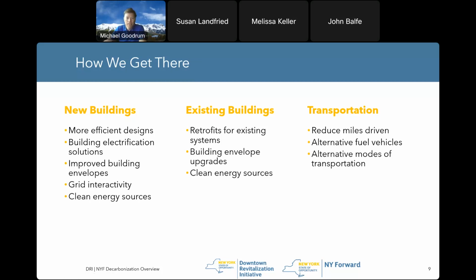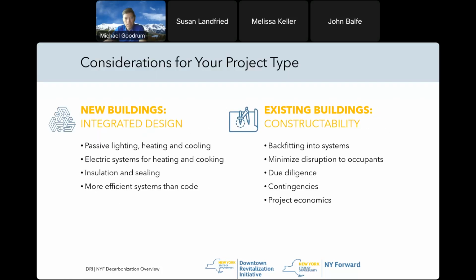Now, like I said, we're focusing really on buildings for decarbonization within the DRI New York Forward programs. So thinking specifically about buildings, if you've got new buildings, having a mindset of integrated design and really bringing all of the team members together at the beginning to talk about what your goals are, outlining what they will be, and then building that into the design from the beginning. A lot of that is just to avoid having to come back and do redesign later. It can streamline your schedule and also help with reducing your costs by not having to go back and redesign.